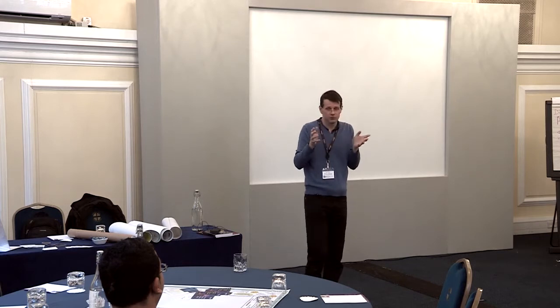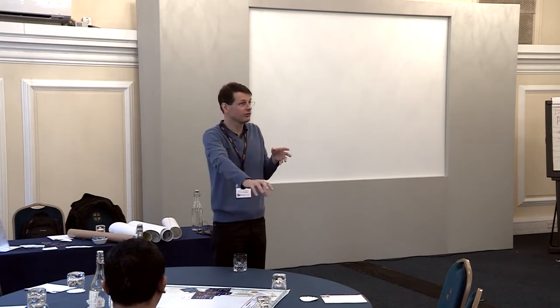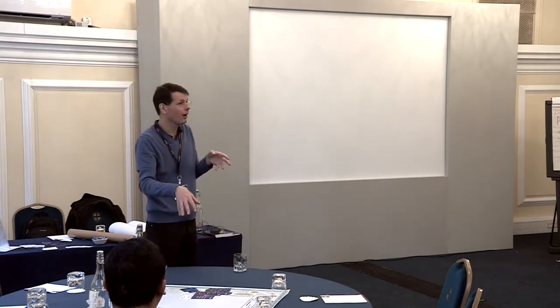All the sheets follow the same format. There's a set of questions around the edge. The first couple of questions are set up. Then they ask you to consider what happened, ask you to consider what you could do, and then narrow it down to some things you actually will do. So I say they're all free on the website, all the retrospective sheets and these.